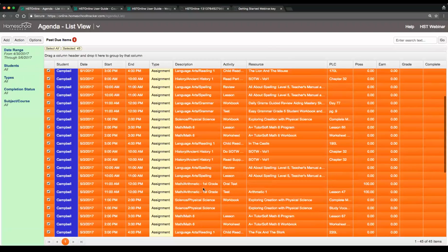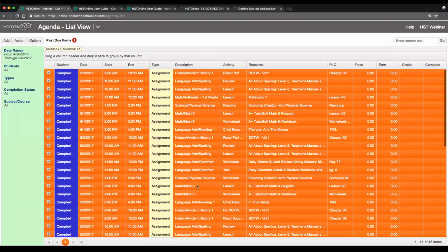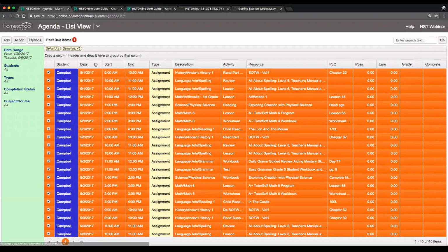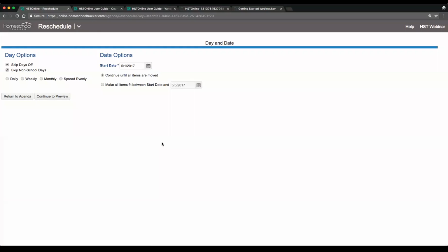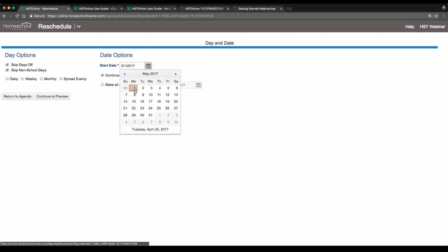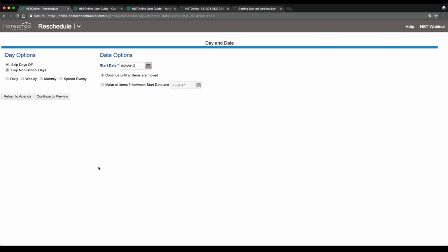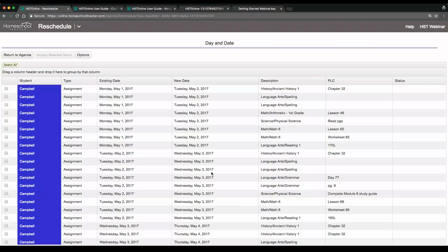So let's say she was sick on Monday. I want to move everything forward one day. I'm going to select all 45 of these and choose action, reschedule. Okay. Right now, the start date for these items is May 1st. All I have to do is move that to May 2nd and hit continue to preview.